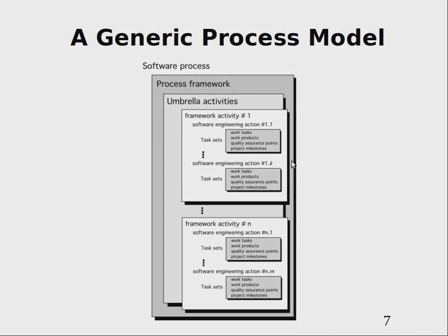And then smaller parts, in many kinds of situations, these may be going concurrently in parallel in separate threads of activities, are things called activities. And then inside these activities are different kinds of tasks, and a task is usually the smallest unit which you use to manage these projects.